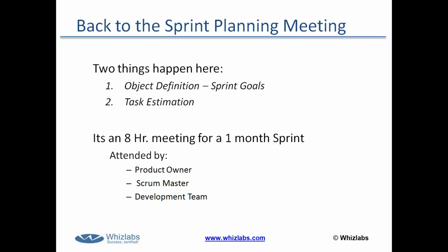Please remember that in the sprint planning meeting the developers speak to the product owner to try to clarify these user stories, right? And try to decompose these user stories so that the developers can work on them as work packages, right? The work package is the smallest package, and here in Scrum we call them tasks, right? So the developers need to estimate how many tasks a specific user story may require.